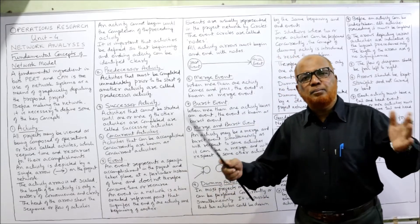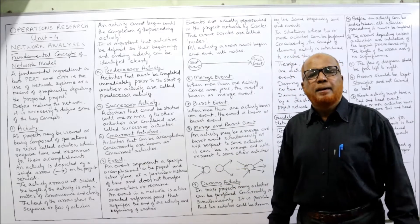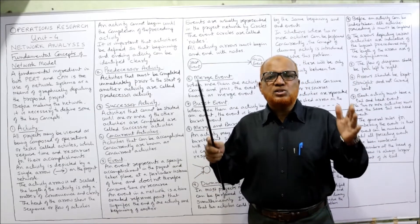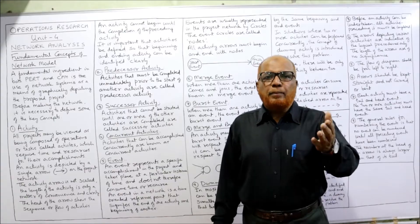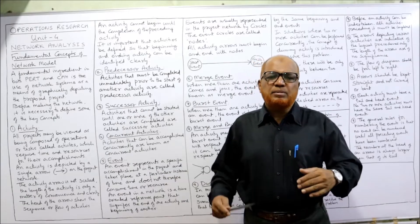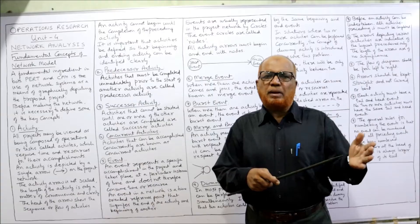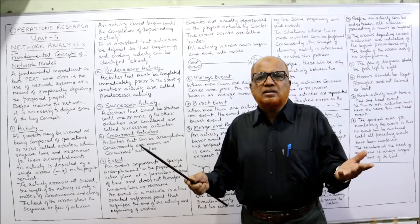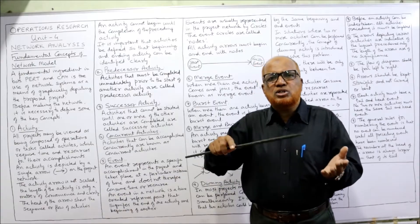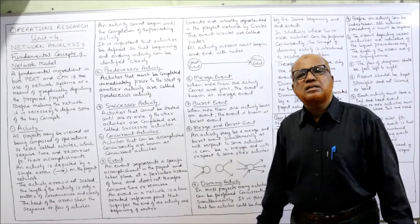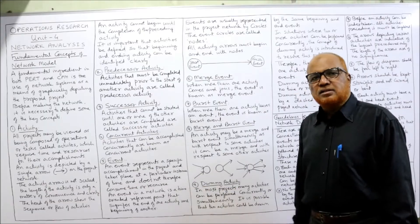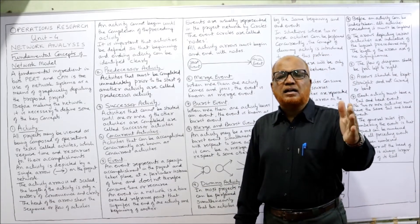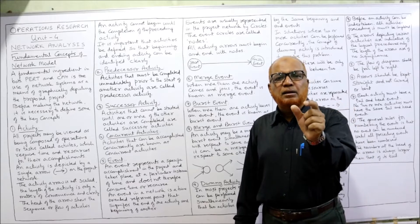A simple example of concurrent activity: in the construction of a building, the plumbing work and electricity work can be done simultaneously. The plumber will do his plumbing work and the electrician will do his electricity work. These two activities do not have any dependency relationship, so both are concurrent activities.